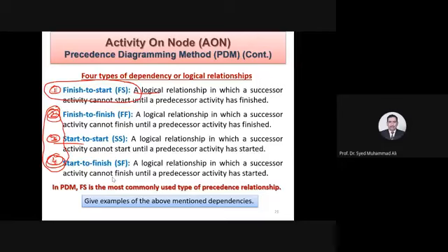We can go into production and finish it in, let's say, 10 days. By the time your design finishes in 10 days, we will produce it. We will make it ready. However, if your design is not okay for 8 inches, no problem. We will not penalize you, and we will keep this stock and you can go elsewhere, for example. So the production of the blocks has finished, but this activity will not finish unless and until the design is finished.